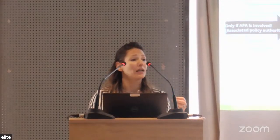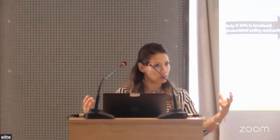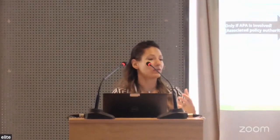Even if, for example, an activity didn't happen or wasn't carried out. For example, in this semester 1, we had a workshop and for some reason didn't organize it, you have to put this information on the board: why it was not organized, what needed to happen, and how we're going to fix it. If there was a change in the original plan, you'll have to justify it. If it occurred, you'll have to describe it. But if something changed, as Alexandros mentions, you'll have to be very explanatory as to why this did not happen and what measures you've taken to actually make it happen in the future.